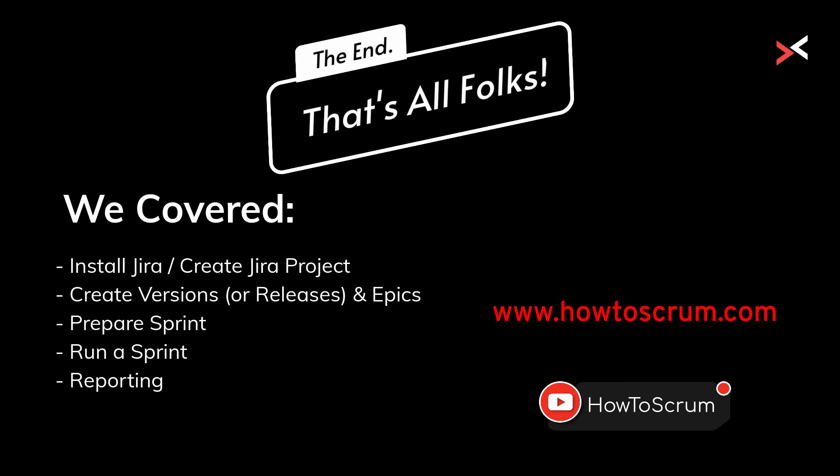Underneath that, we created stories and tasks. We prepared the sprint in terms of refinement and estimation, assigning to the Scrum team. And then we started the sprint. Once the sprint was started, we talked about how to complete that sprint.